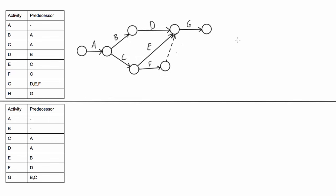So next we have to do is just draw activity H and then the last thing we need to do is we need to number each node in a way that every arrow points from a lower number to a higher number. So I would do it this way. This way we can use these numbers as what's called a unique IJ number to identify our activities as an alternative to using their name.